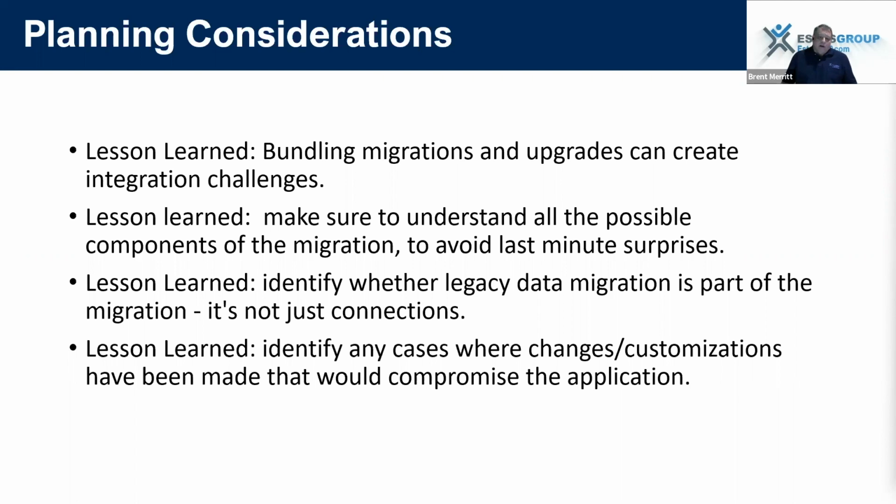Identify any cases where changes or customizations have been made that would compromise the application. A prime example would be Dynachange going from legacy to the web UI. If you don't do the migration on the front end when you need to, when you go to the back end and get to the final process of what you're doing, they will not work.